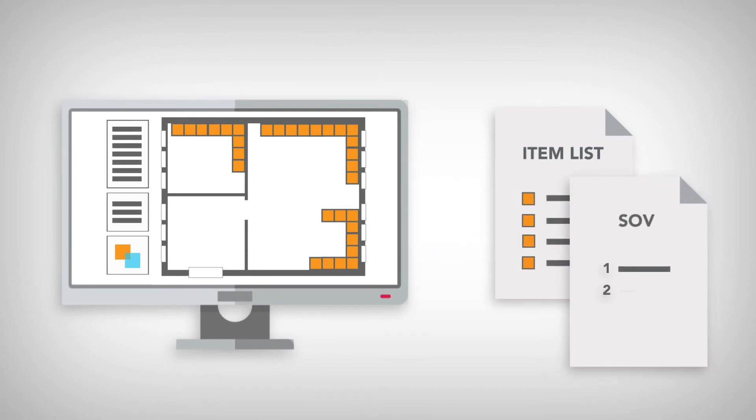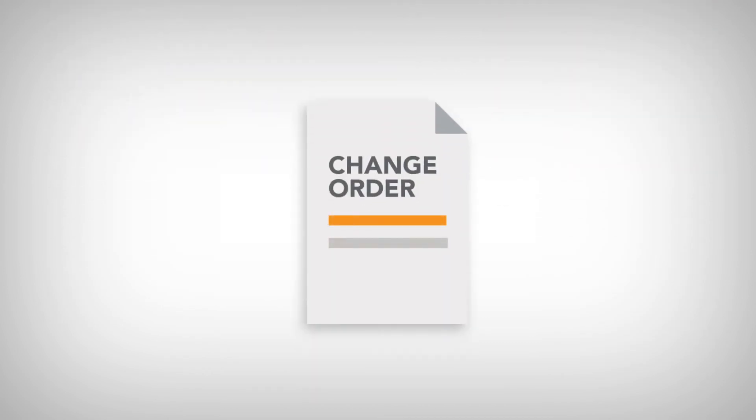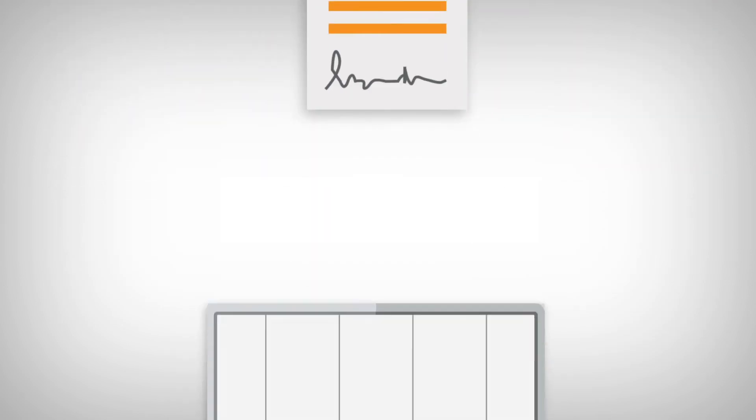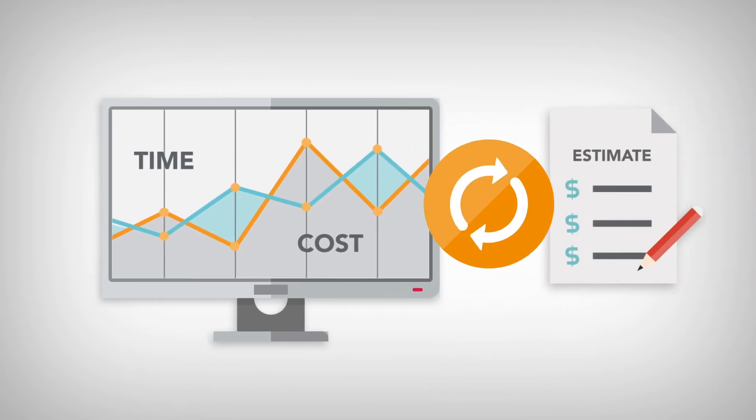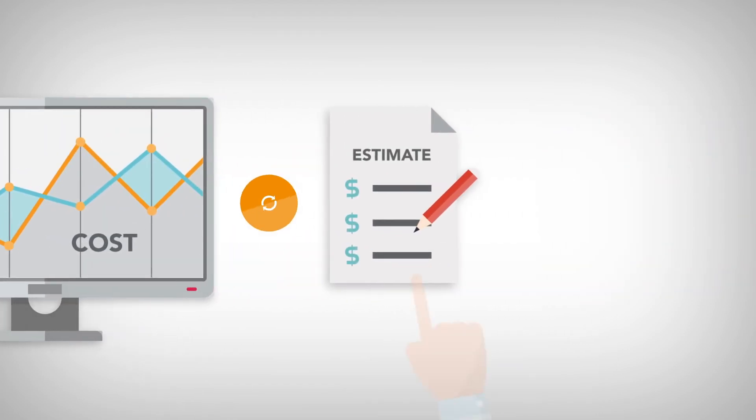Manage change orders, track actual time and costs, compare costs against estimates, and apply them to invoices.